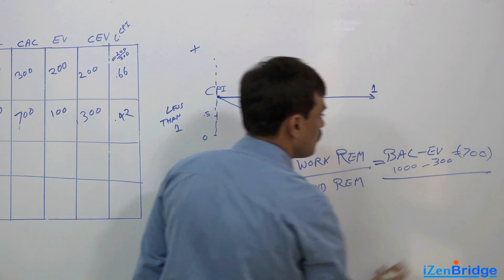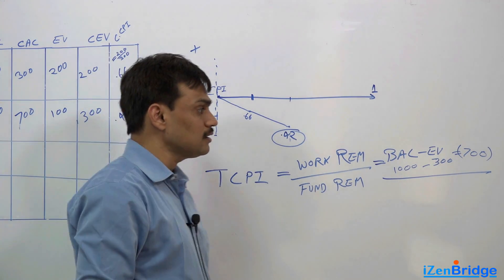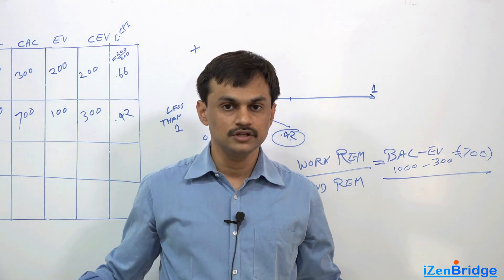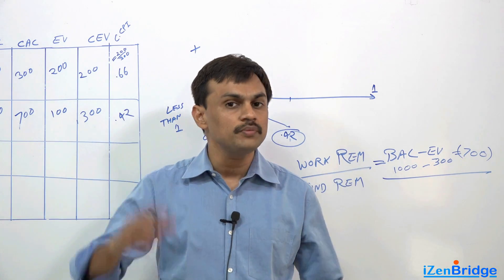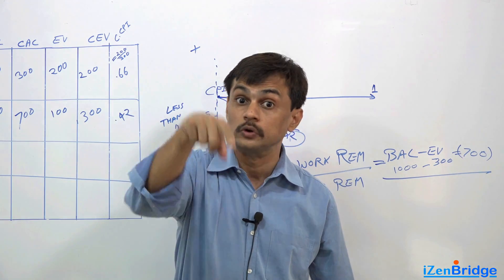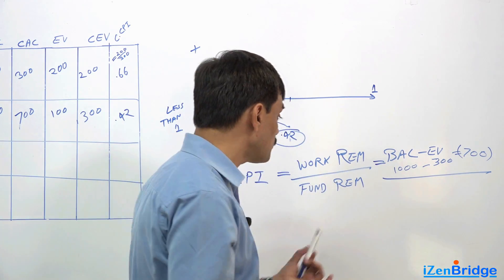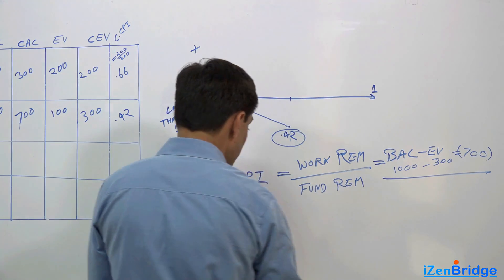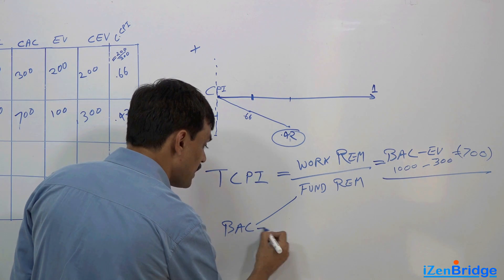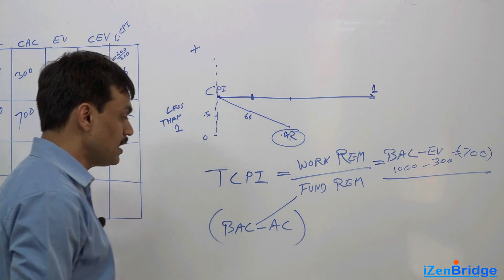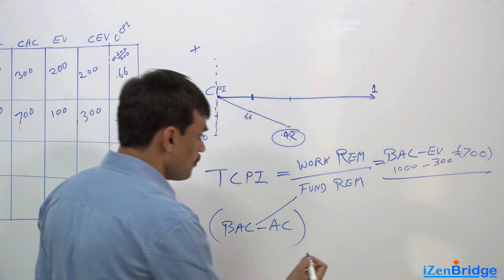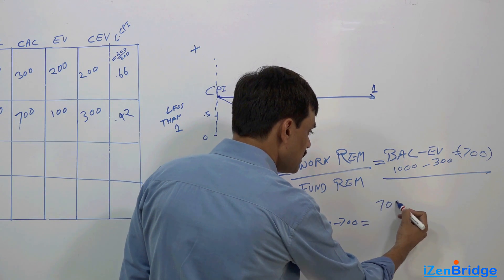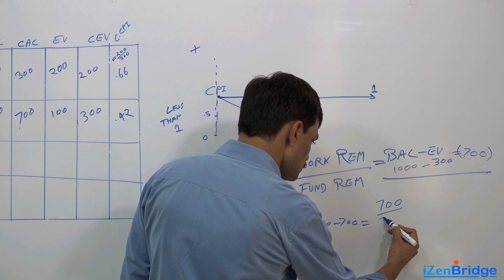Now what is fund remaining? Now fund remaining - one is that we had a budget at completion of $1000. So if we say there is no revision, there is no estimate at completion, you just need to make sure that you get the work done in $1000 only. If we get that information from management, then our fund remaining is $1000 minus $700. So one way of calculating fund remaining is Budget at Completion minus Actual Cost.